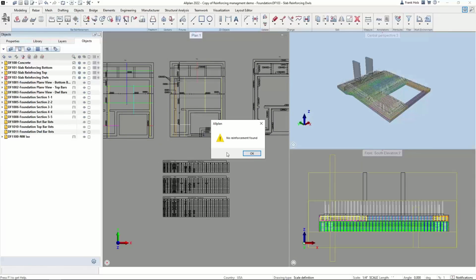And then notice if I click this again, it's actually going to scan that and see that we've already released. So they've been assigned a status of release to Soule. So ALLPLAN is intelligent enough not to accidentally release those bars again unintentionally. So the way we have it set up here is we've given the ability here to not release something again. We're making it difficult, like with any software program that it comes to detailing, is we don't want the easeability of actually releasing something twice.